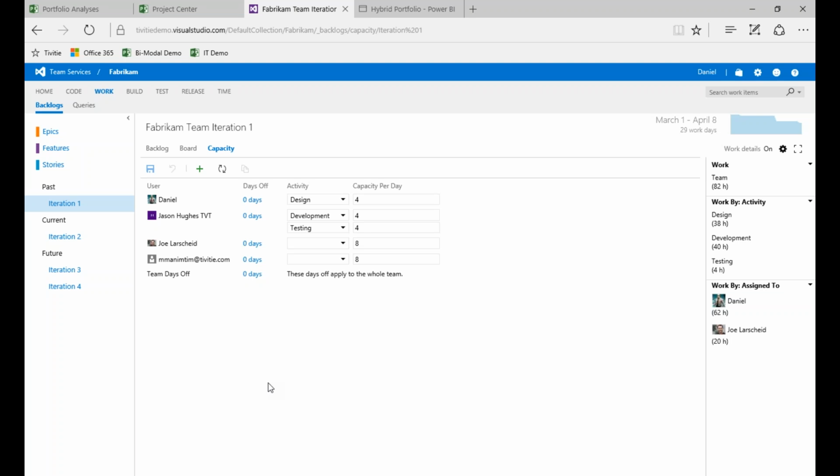What's missing, as we talk about Agile with SAFe or rolling up to a portfolio in PPM, is that more broad capacity view across all work efforts, because these teams or these people that are supporting these teams may be working on a multitude of efforts across the organization. So the idea there is, how do we get that information viewed from in here? It's very difficult within Visual Studio Online or even most Agile tools in this type of view, because it's really focused on the team delivery.